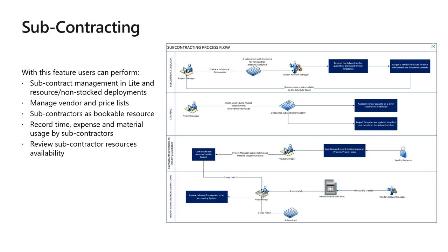Then obviously the next piece of the puzzle is, all right, the project work has been delivered, but you're now receiving a vendor invoice from the subcontract vendor. So there obviously needs to be a reconciliation process for that. How that works is you create and post a pending vendor invoice, and there's now an additional field on the vendor invoice header, which says whether the invoice should be validated on the Dataverse side or not.